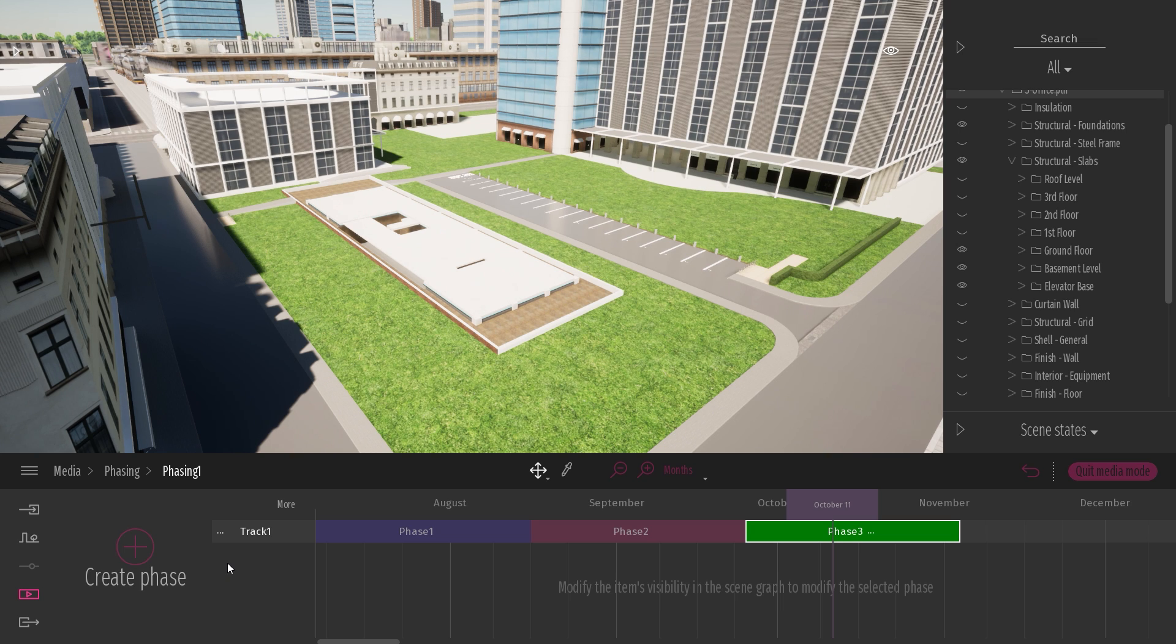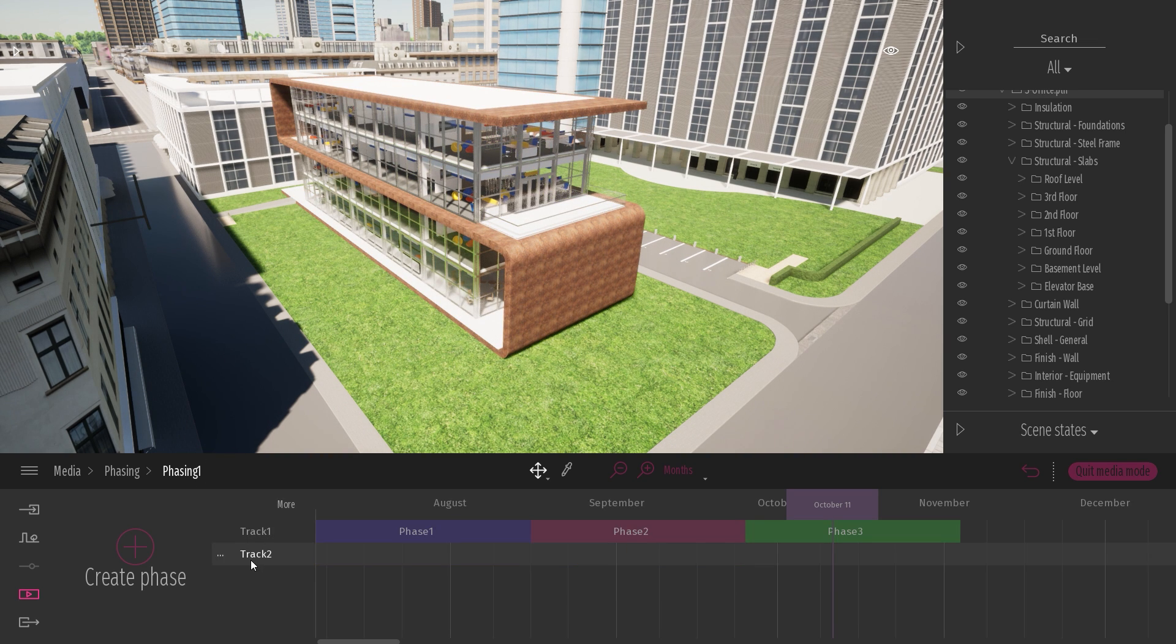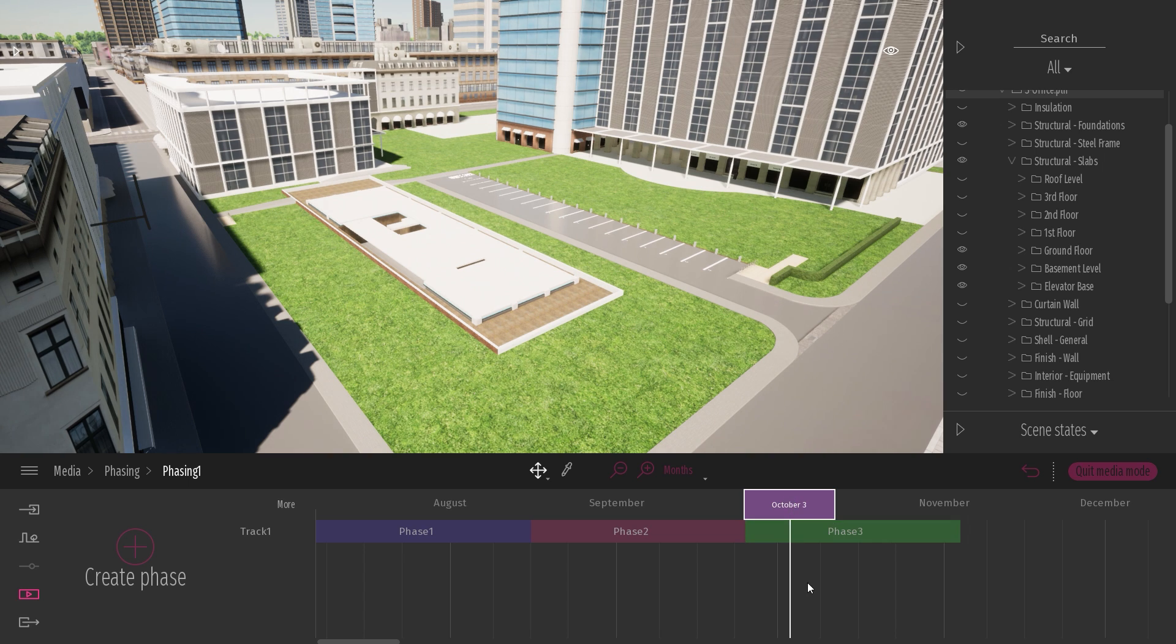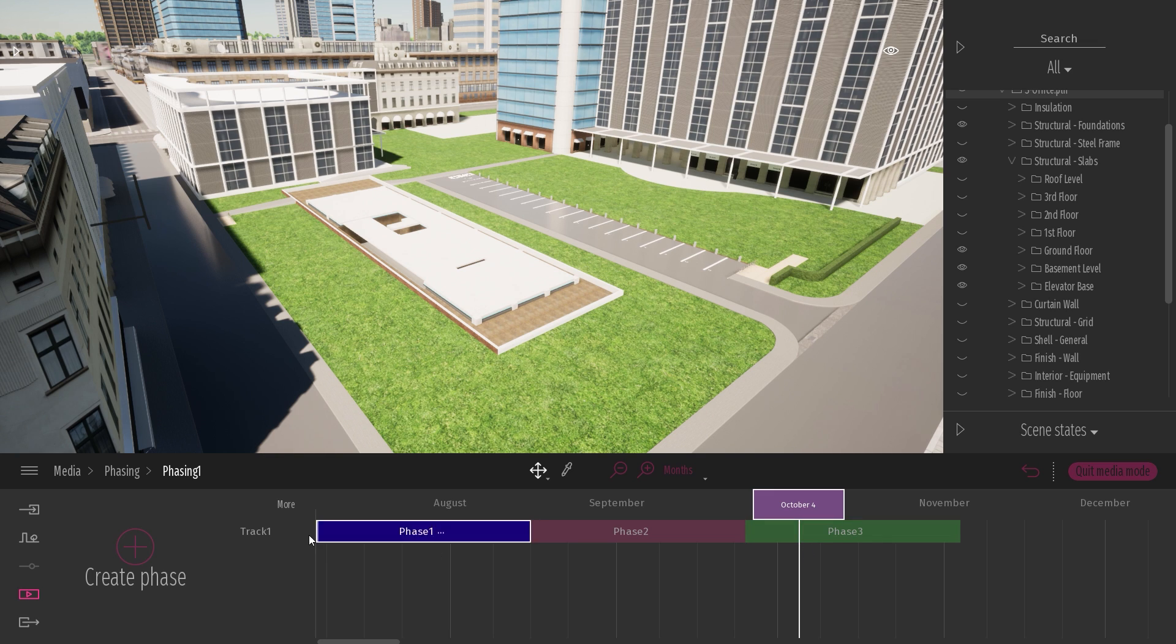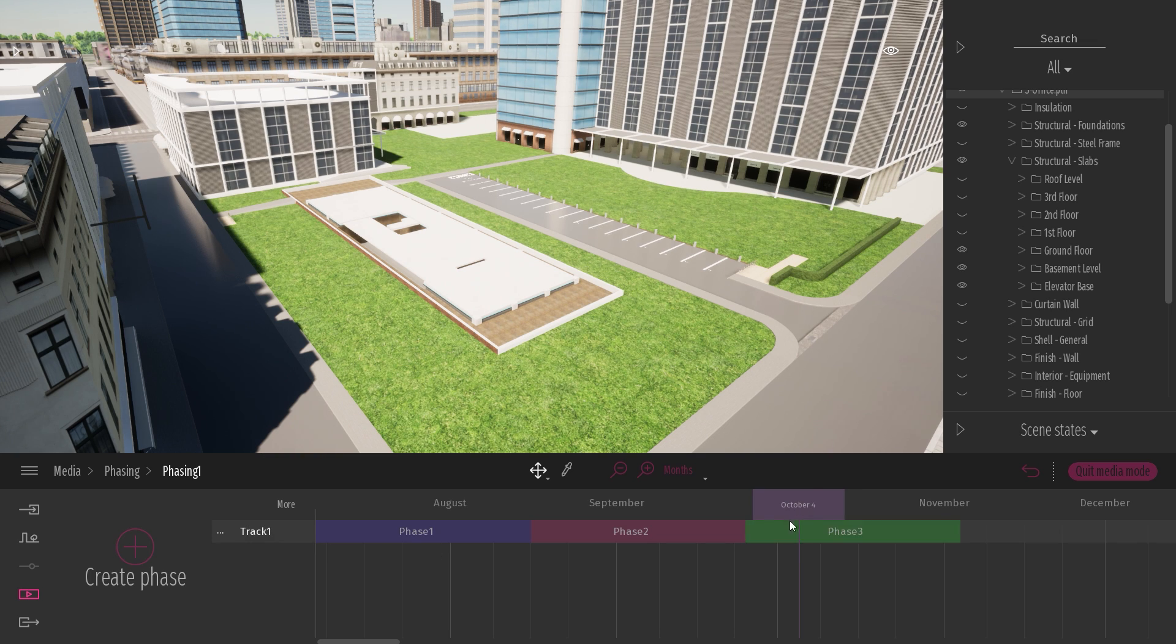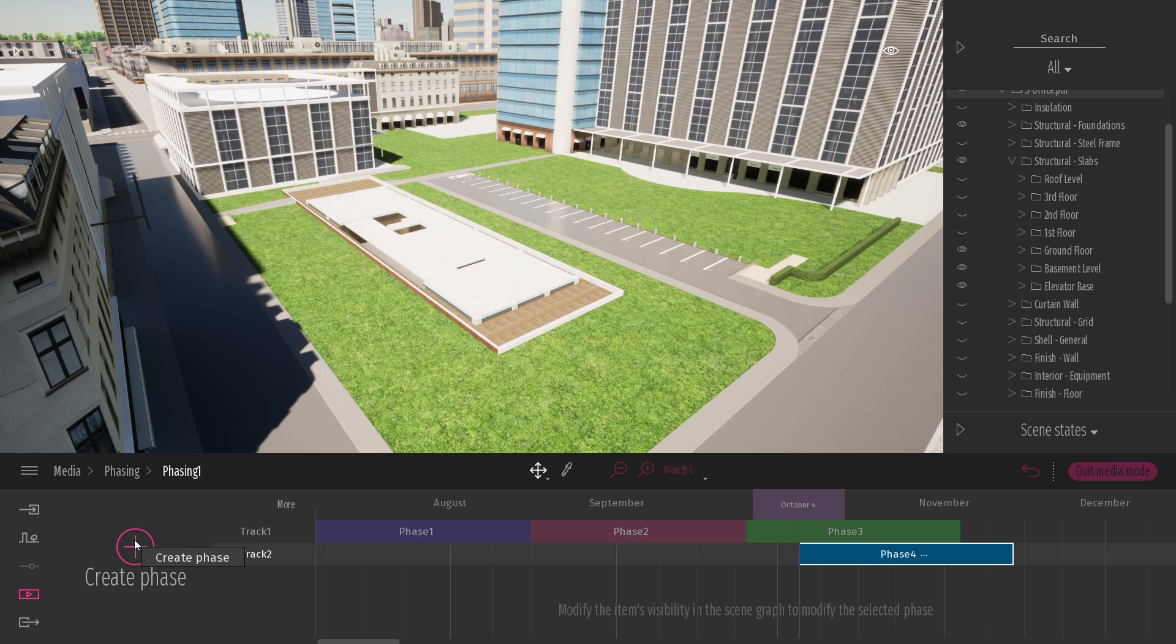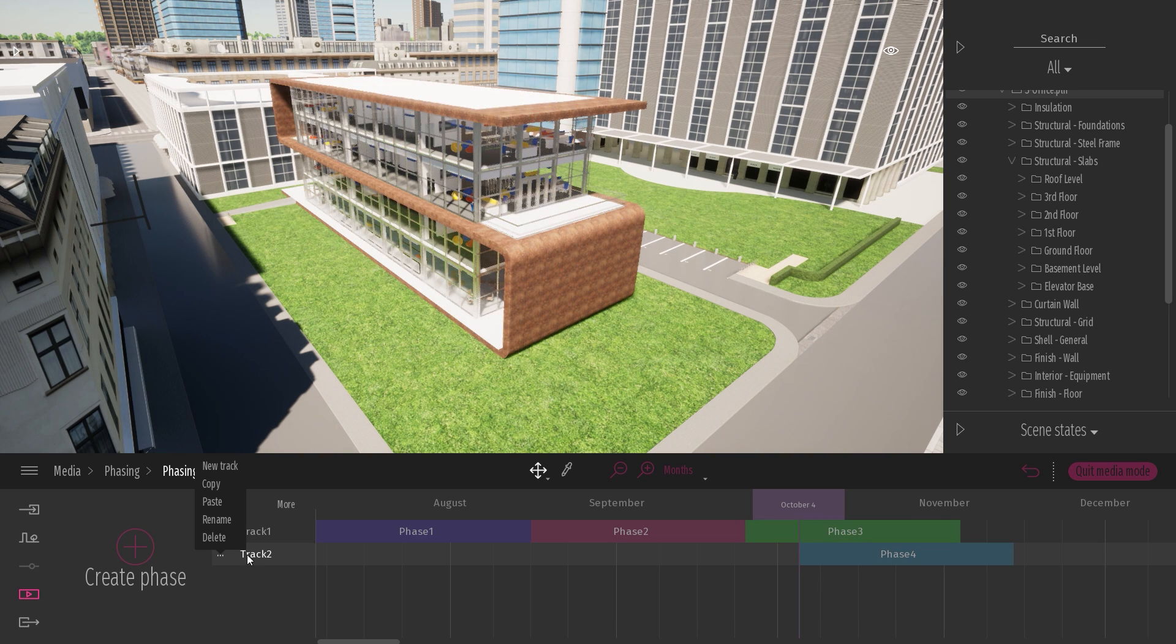To create a new track, there are two different ways. Either you can click on the three dot button over here and click on new track that will create a new empty track, like here. Or what you can do while you are inside your phasing, if you select the timeline and click on the plus button, it can't create a phase on the first track because there is already a phase present at this time. So it will automatically create a new track with the new phase. So let's check it out. I click on this plus button, and as you can see, it has automatically created a new track with a new phase.